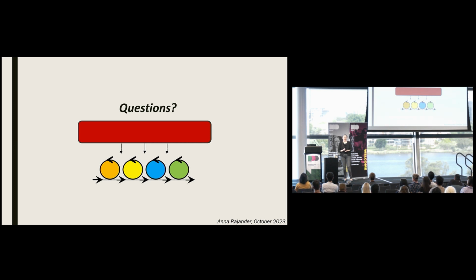Personally, there's a great tool in the business analyst toolkit called the Straw Man. I tend to put together what I think is a realistic timeline and then consult as widely as possible, and see what people say when you show it to them and get them to be realistic, to talk through what might happen, what the risks are and all that sort of stuff. When you talk about waterfall, we use waterfall when we have to deliver a defined scope. Time is largely irrelevant. People always talk about time because time is often associated with money. But at the end of the day, you can't half implement a 1 megawatt battery, for example. It's either all or nothing, and it takes as much time as it's going to take.